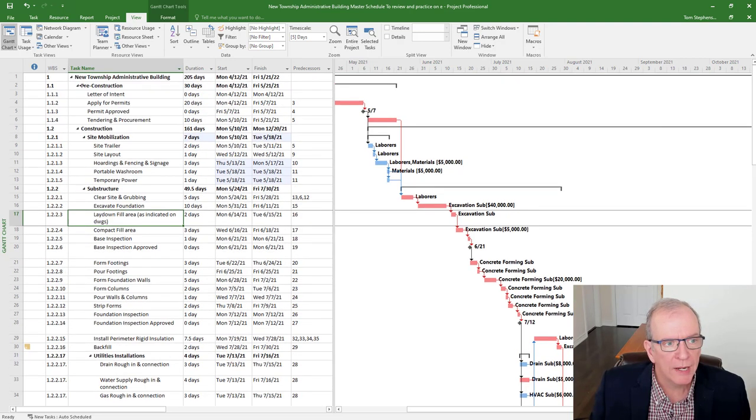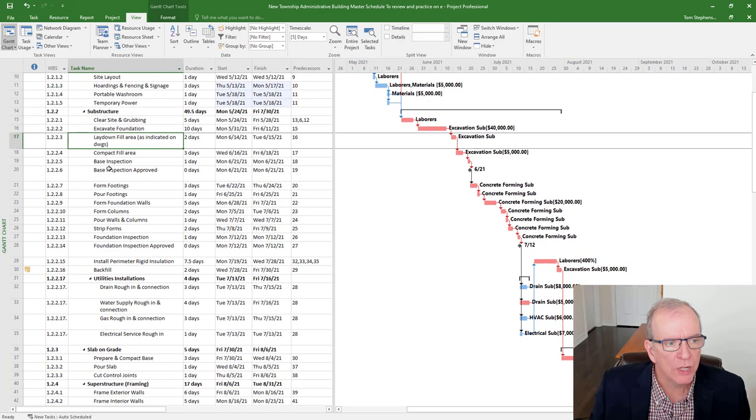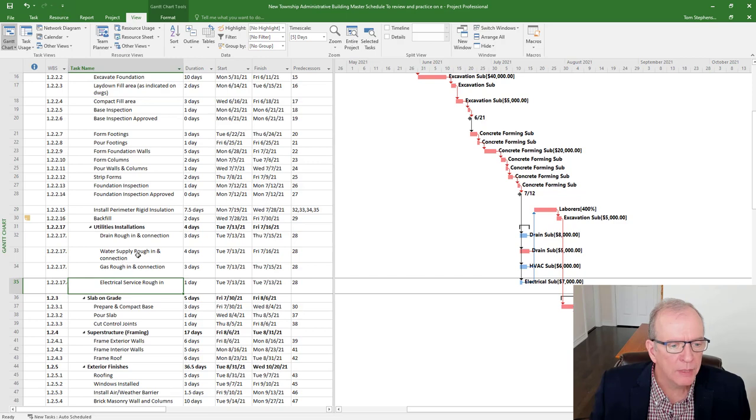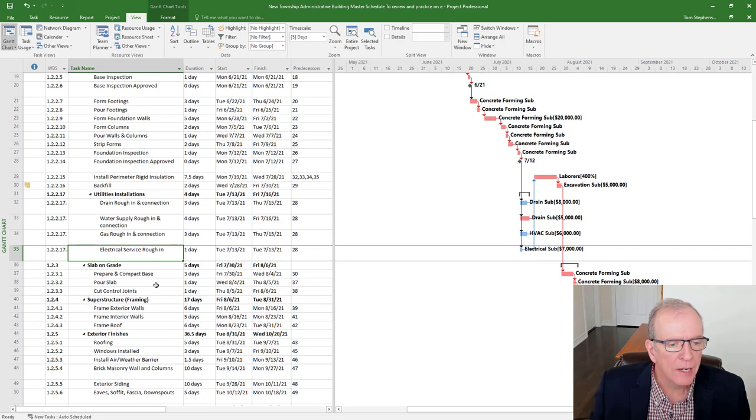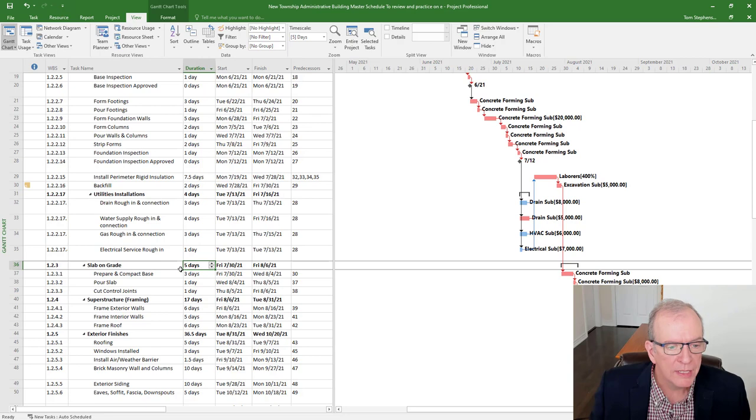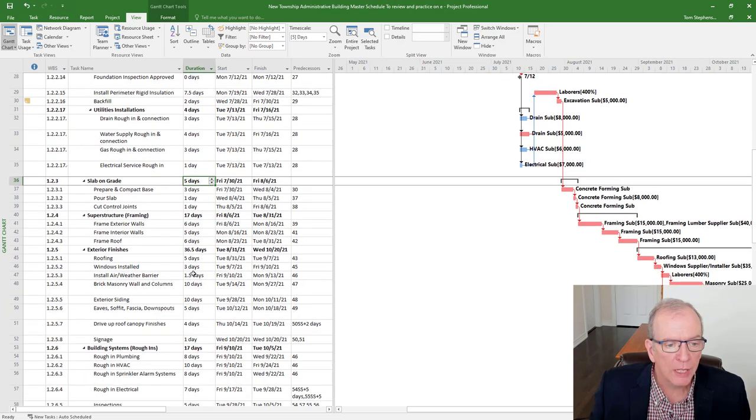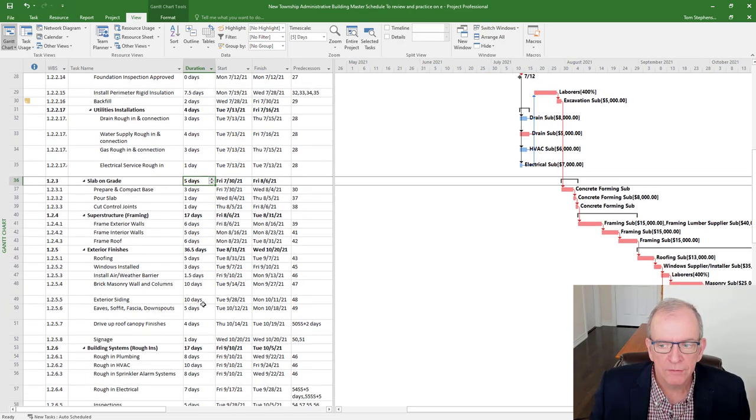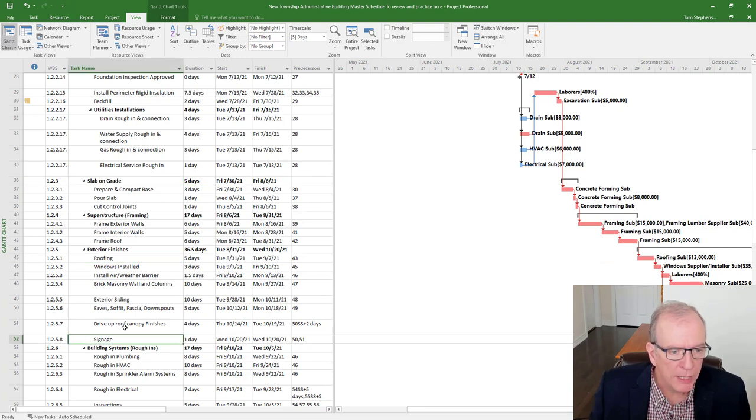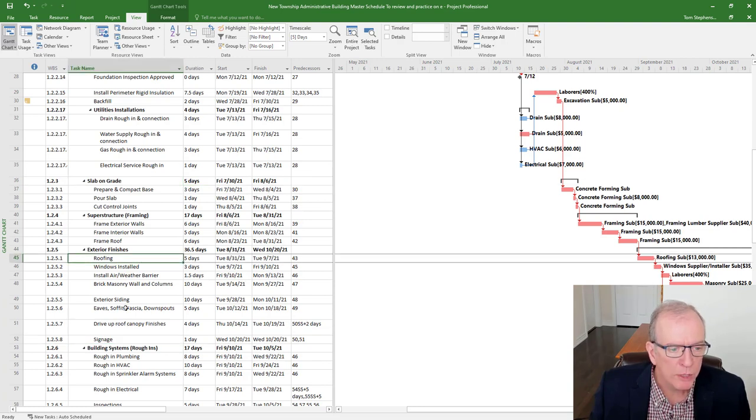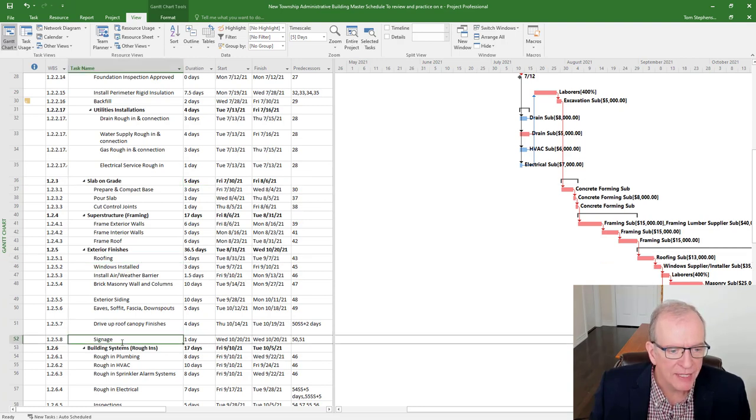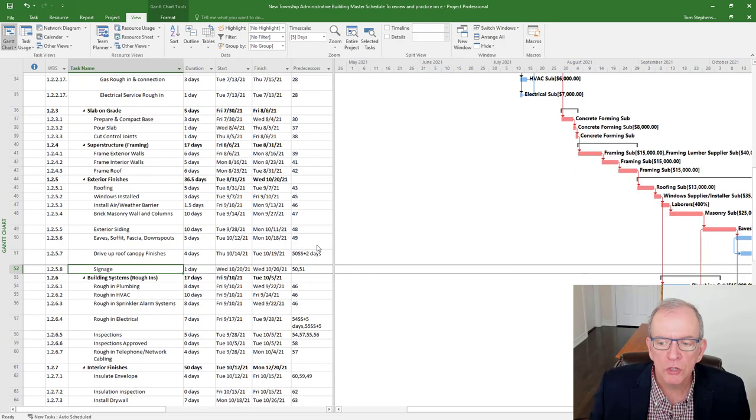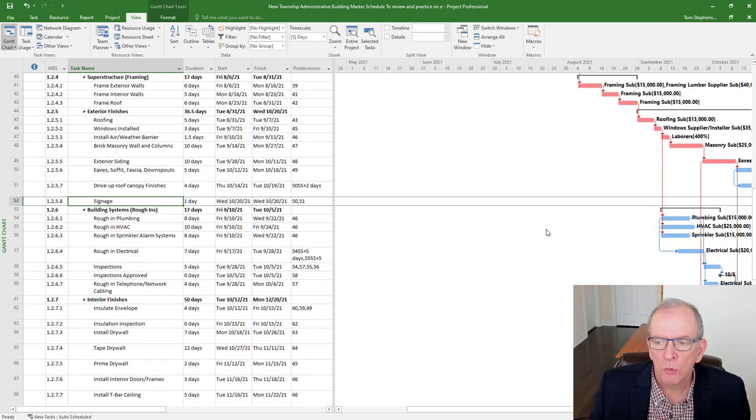So you want that nice clean work breakdown structure. And then under the groupings, you can have different elements of work. And the nice thing about that is that it also gives you headings that will tell you how long this slab on grade work is going to take in total. And it's not just adding these up. It's also looking at the sequencing and combination of activities.